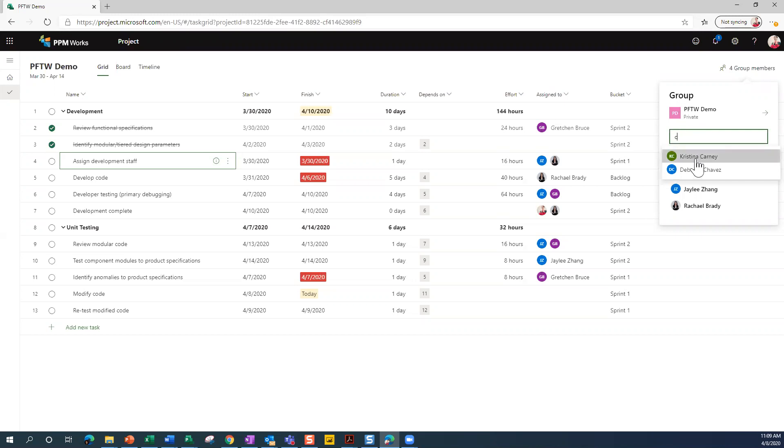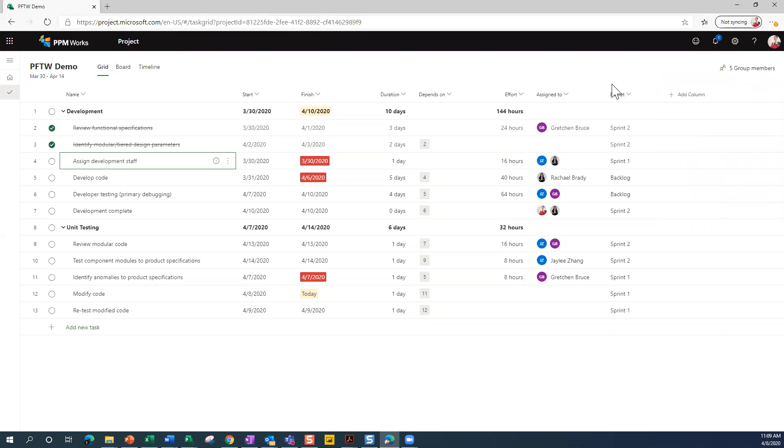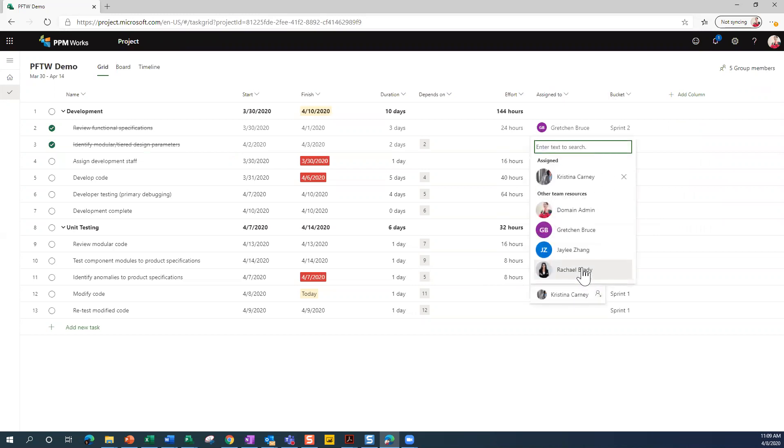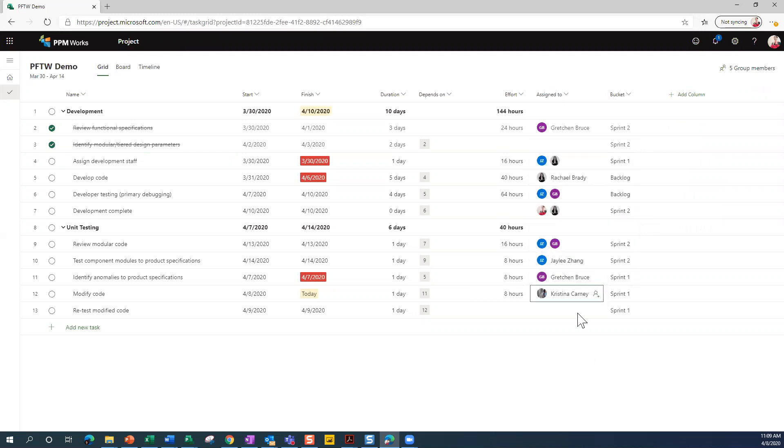So I could add, let's say for example, Christina to our team. Now, if I wanted to assign Christina to a task, all I have to do is go down to that task, click on Add Resource, and then I can select Christina's name. Notice I can also select multiple names as well. You can see some of the tasks have multiple people assigned to them.